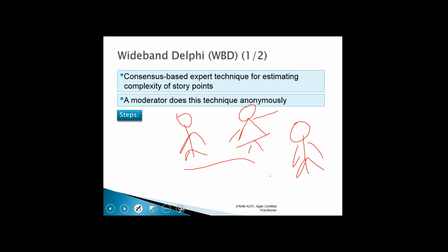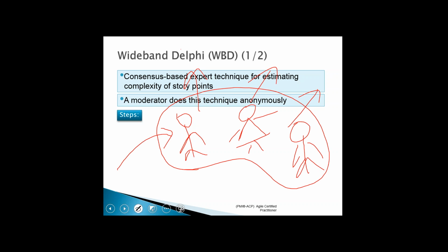You call everyone to a single meeting first. You explain about your requirement and let everyone go away. You'll not disturb them. You call them, explain, and let them go away. After that, you're going to approach each and every person individually, anonymously, and try to gather the requirements.